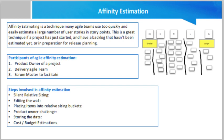Then items are placed into relative sizing buckets — groups labeled according to the estimation scale of choice. For example, buckets can be labeled as extra small, small, medium, large, extra large, or based on a nonlinear scale with story point values such as 1, 2, 3, 5, 8, and 30.